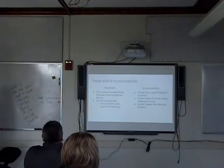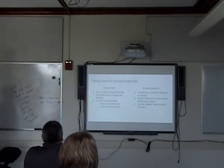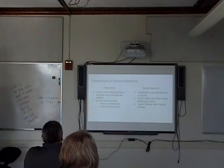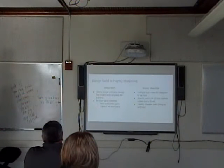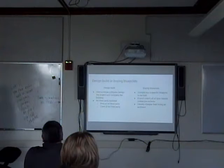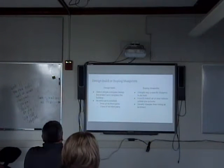You can also go through a design build company, which is a company that does architecture and construction work. So that means there's no third party involved. The pros of that are it doesn't take any time to go between the architect and the contractor to throw ideas around. But the cons are there's nobody else watching the construction, there's not a third party there making sure that everything is going well, and that they're not cutting corners.